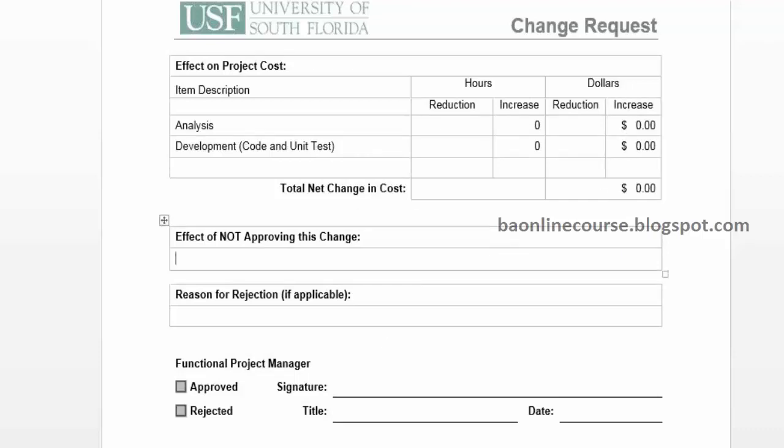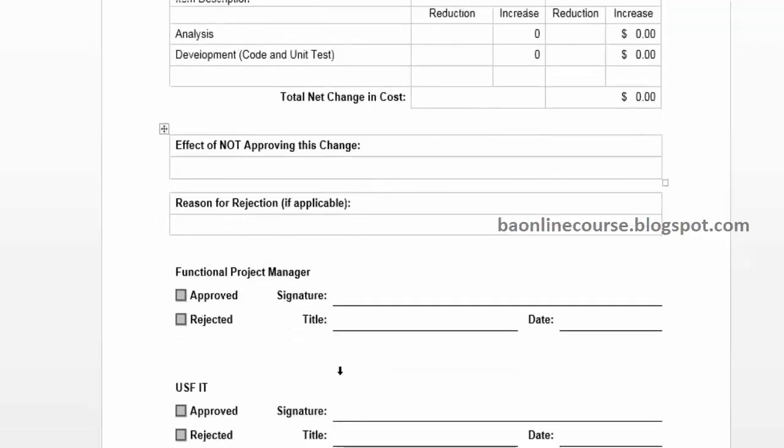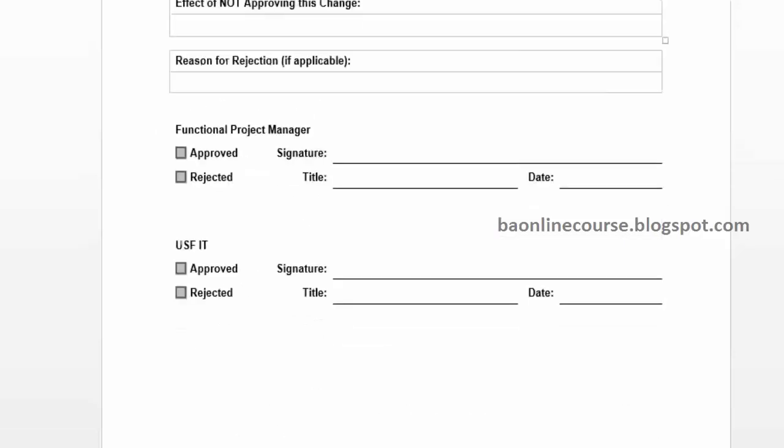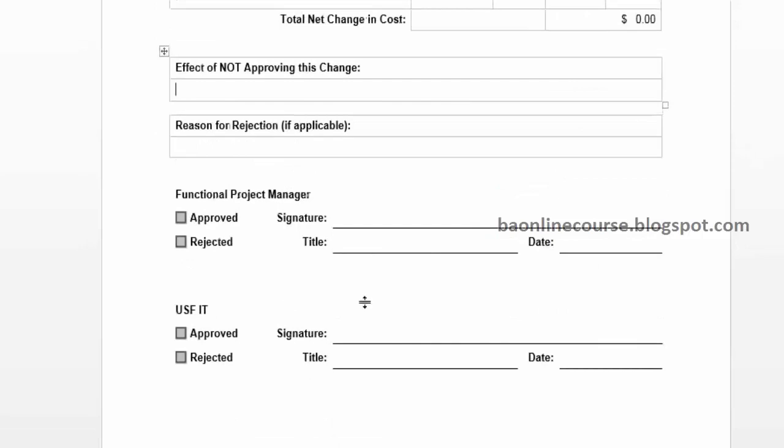So then finally you'll send it to the approval manager, right? Whoever is the SME or the project sponsor or the solution owner, they would take the decision of whether it's approved or rejected, and they would specify the reasons, and finally it would be approved by the IT team and implemented. Right? So that is the process of a change request. Change requests are much simpler than your overall BRD.